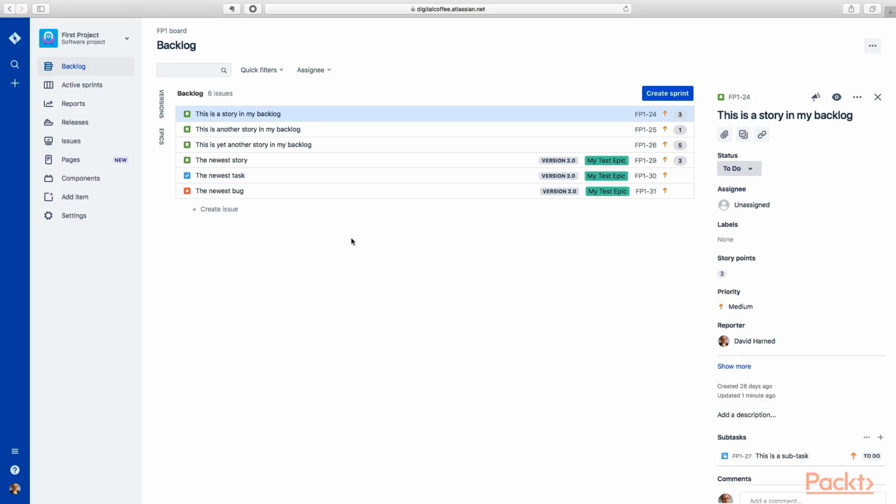And any of your items that have been fully refined, which means that all of the questions have been answered, all of the understanding of what this thing is has been defined, and they meet what's called a definition of ready for your team. Your definition of ready could mean it's got acceptance criteria in it, so we understand when the product owner will think this item is done, and other criteria will be met in order for it to be ready. We want to have ideally at least 2 sprints of ready work that's ready to go at any time. So let's do that first.